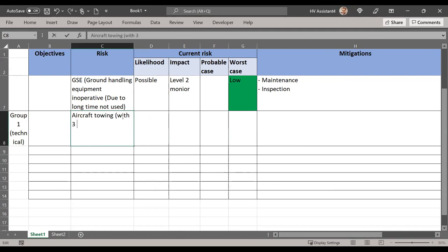Firstly, risk likelihood, we are rating number 5. Secondly, risk severity rating is C level. According to the matrix, we identify the risk assessment as 5C level, intolerable.